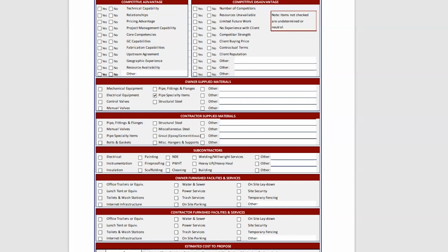But yeah, we had a similar perspective, because after that it's like, okay, now are we going to be able to use the same construction manager that helped us bid it? Because normally, even though we were quote unquote estimating, I was striving to make sure that we developed some basic construction execution plan along with the proposal that we were submitting.